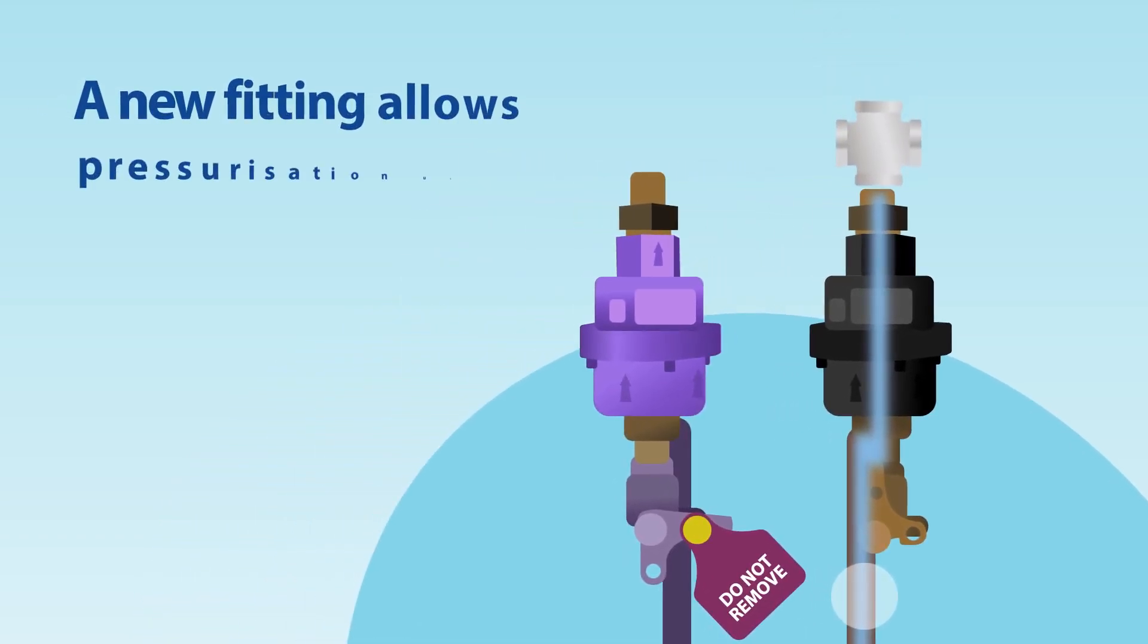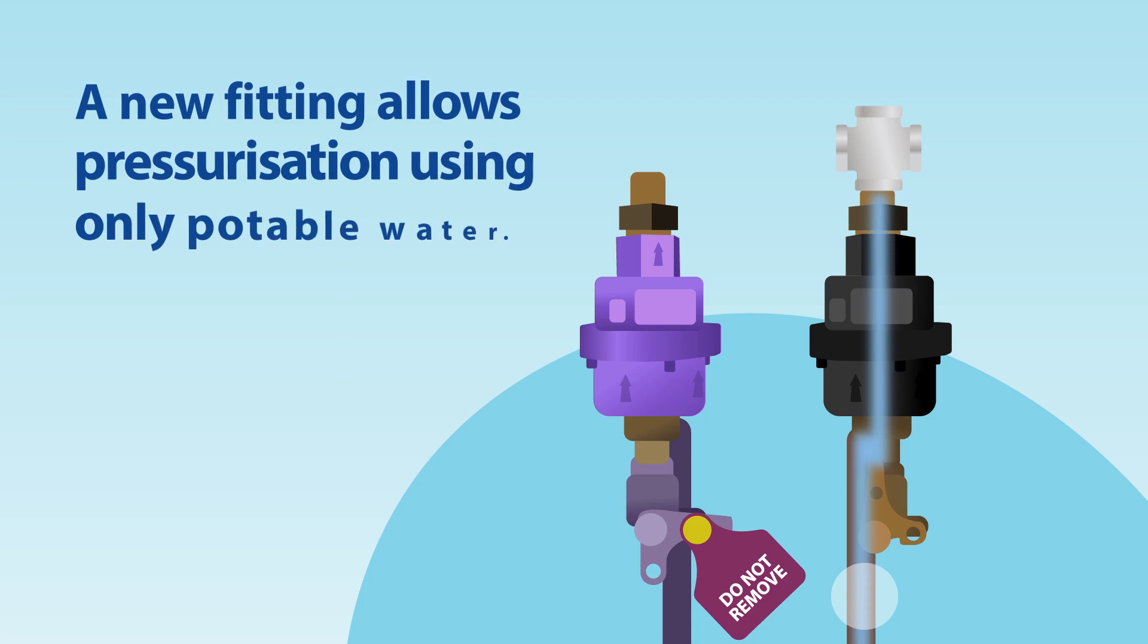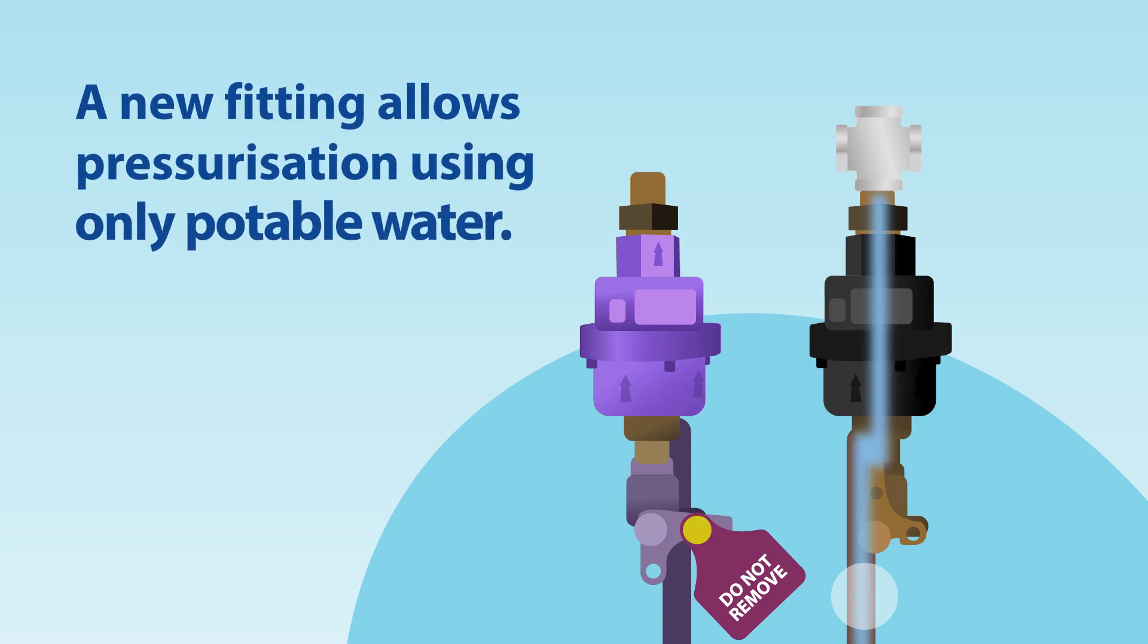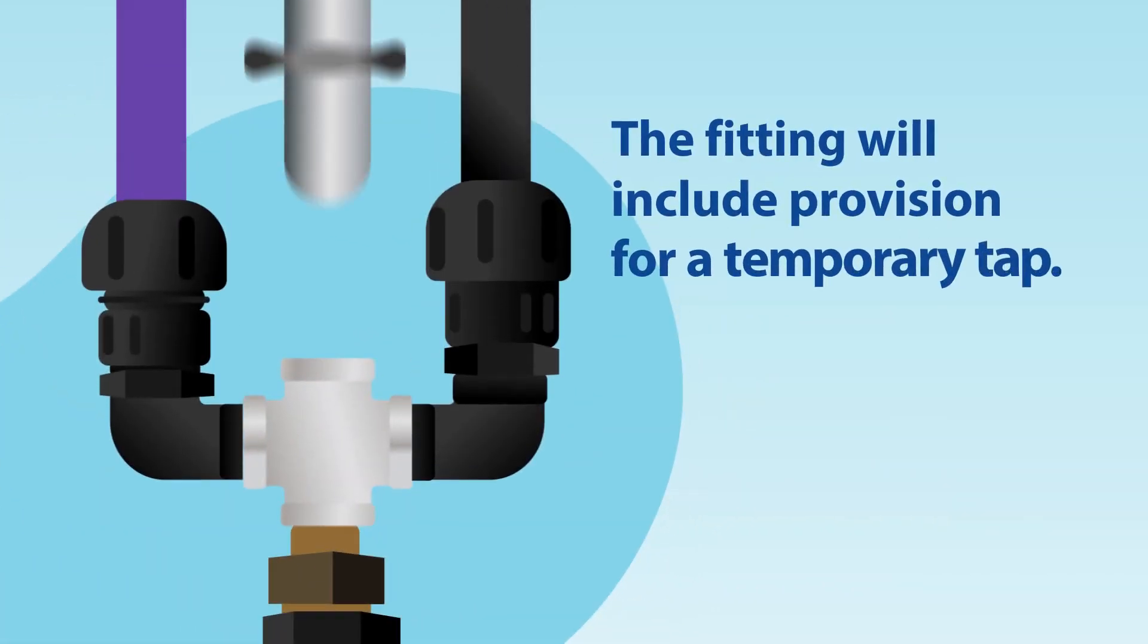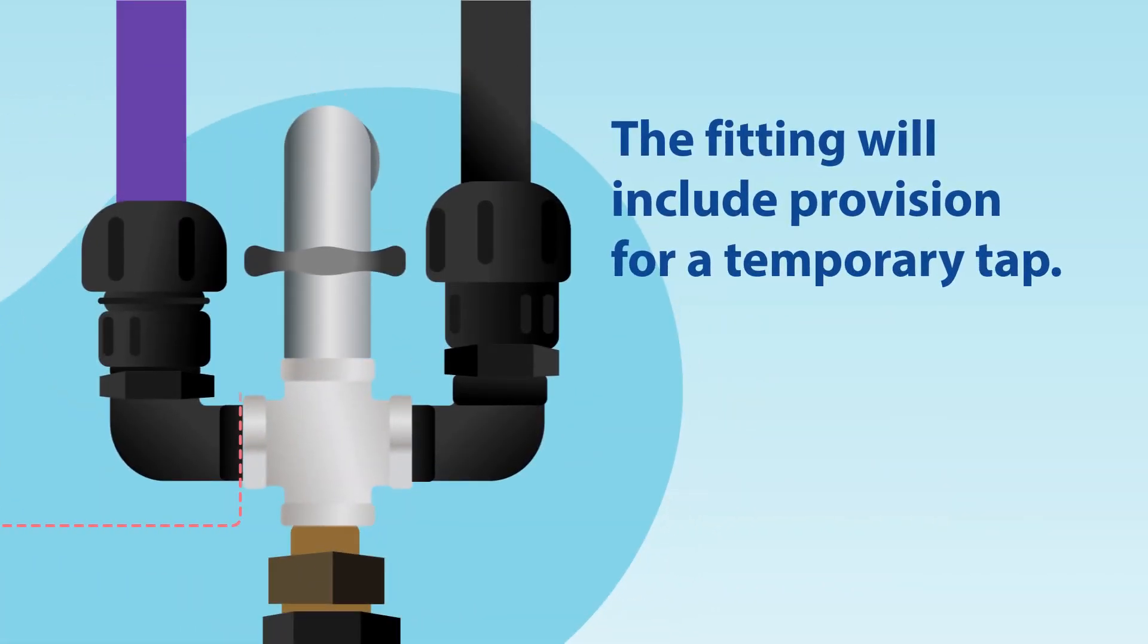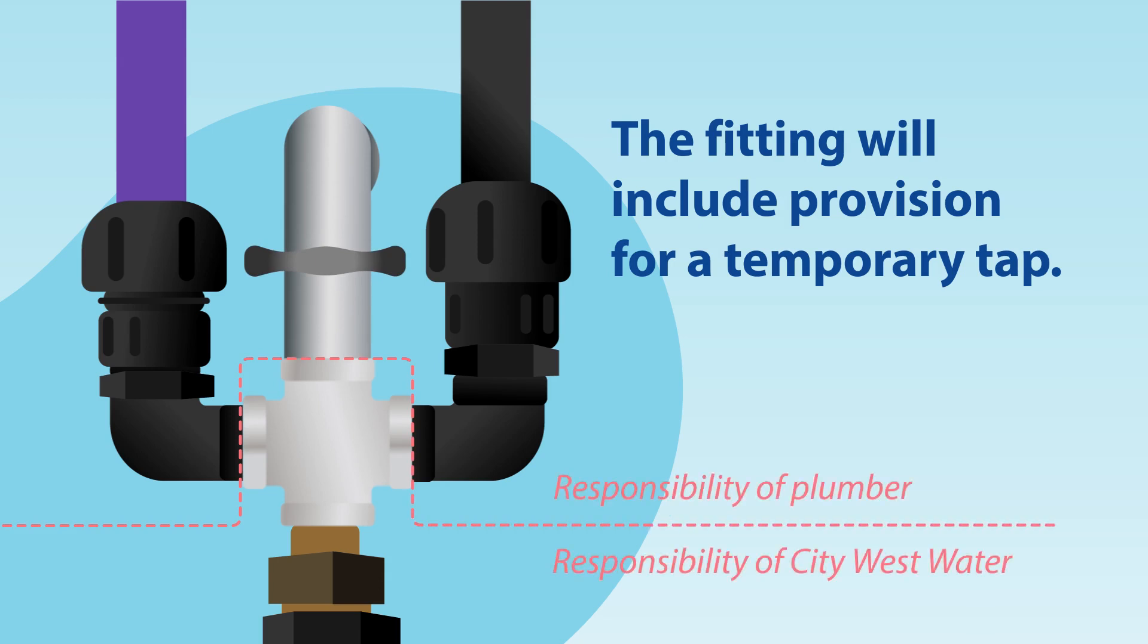A new fitting installed by City Westwater allows pressurization using only potable water and eliminates the connection to the recycled water tap. The fitting will also include provision for a temporary tap to be installed during construction by the builder or plumber.